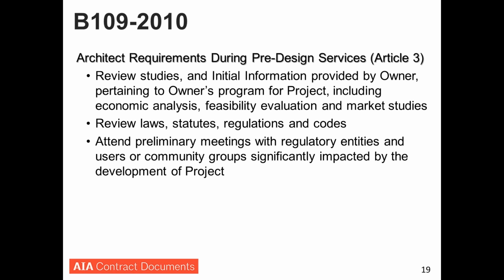And the important thing was to create a specific article for the pre-design services to review those studies, the specific laws and codes and regulations that pertain to residential things like HUD, Fair Housing Act, and those kinds of things, and then to attend the preliminary meetings with the agencies, the authorities having jurisdiction, that are necessary to ensure that the project can go forward. Really stuff that happens before a developer is willing to pull the trigger on the project and commit himself or herself to your big fee and the entire enchilada.